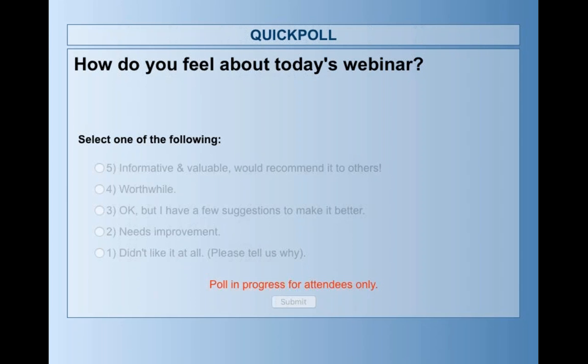How do you get the sum of the story points to be shown on the main ticket? On the statistical dashboard, on the overview for the releases and sprints, it's calculated automatically. You set up story points for each separate item, and then it's aggregated up to the statistical overview on the dashboard of your releases. So you have a release and then sprints, which can have sub-sprints and so on. All the items in the release or sprint or sub-sprint have story points, and those are aggregated to the higher level. And that's how you can visualize how much you've committed and how much has been completed.